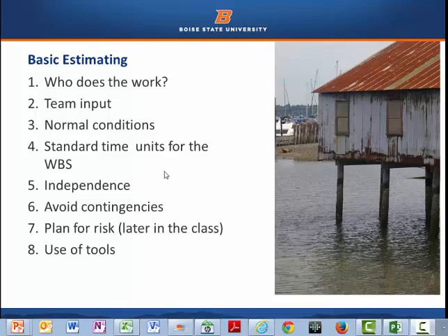Try to plan under normal conditions, but normal is kind of hard to define sometimes in business. Use standard time units for the WBS. If you're going to be using weeks for your task, use weeks. If you're going to be using months, do that. If you're using hours, that's what you use. Make the whole program consistent, which will give you a much stronger view and a complete package. Try to be independent. Try not to have outside influences build your times and estimates for you. Have the team build up from the bottom up and get those skills.